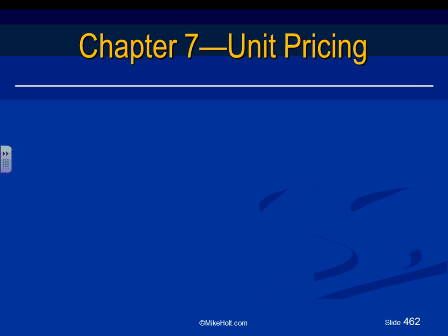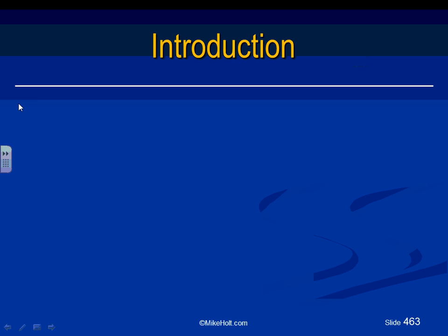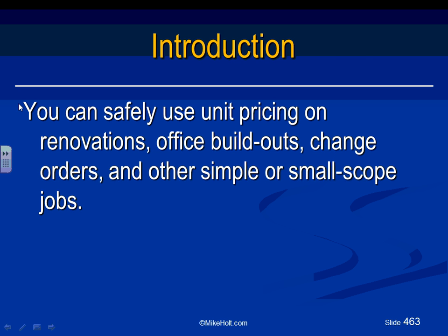That is what the book is talking about when it comes to unit price. Okay, here we go. A couple of suggestions where to use a unit price: renovation, office build-outs, change orders, and other simple or small scope jobs. It has to be typically simple, small scope jobs.